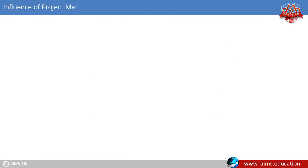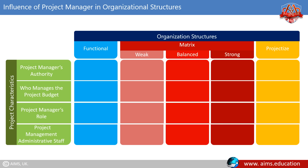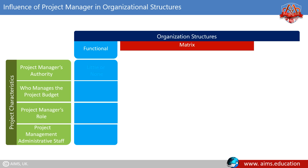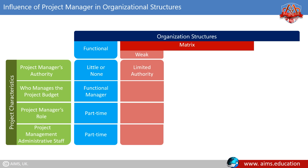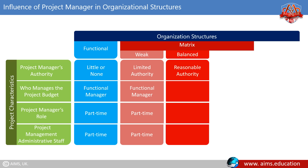In a functional organization structure, the project manager has little or no authority and is often a part-time person with part-time project management administrative staff. The functional manager manages the project budget, and the functional structure is the weakest of all. In a weak matrix, the project manager has limited authority with a part-time role and may have part-time administrative staff; the functional manager manages the project budget. In a balanced matrix, the project manager has reasonable authority with a full-time role and may have part-time administrative staff; both the functional manager and the project manager share management of the project budget.